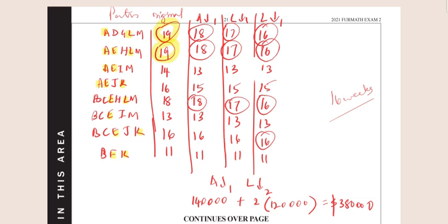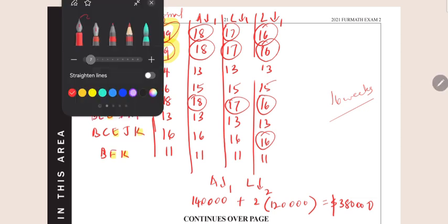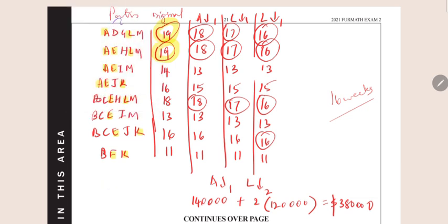Now, I checked out and saw which activities were common between them, and I found A to be common between these two paths. And then I thought, okay, let me reduce A by 1. And so that brings 19 down to 18. This is 18. And in the first four paths, the A exists. So 14 to 13, 16 to 15, and the others remain the same. The largest value is still 18.